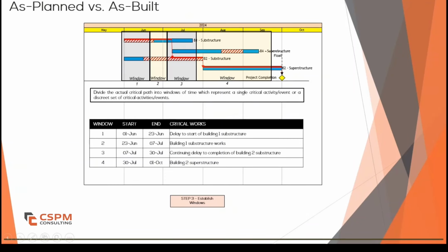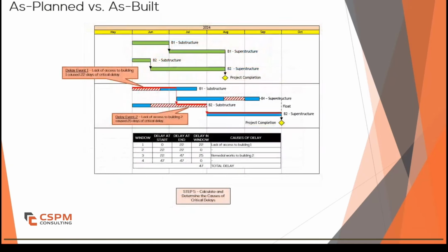Intervals versus windows analysis. A key point to remember is that these delayed periods are not necessarily treated as windows in a window analysis. Instead, we analyze specific intervals where delays occurred. This allows us to focus on key events that contributed to project overruns.